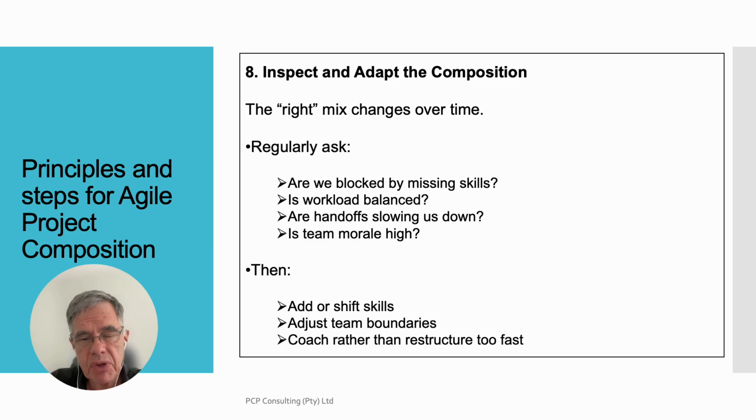Inspect and adapt the composition. The right mix changes over time. Regularly ask, are we blocked by missing skills? Is workload balanced? Are handoffs slowing us down? Is team morale high? Then, add or shift skills. Adjust team boundaries. Coach rather than restructure too fast.